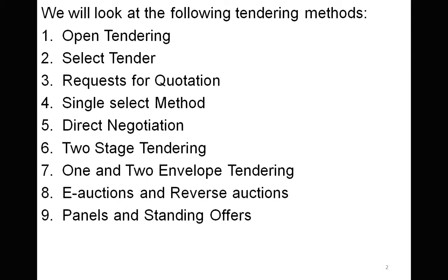If we go back to last week's procurement lecture, really we're only talking about the lump sum type procurement method, which is where architects can be involved. If we have a design and construct procurement method, then the architect isn't involved in the tender, although a tender may well still be called.